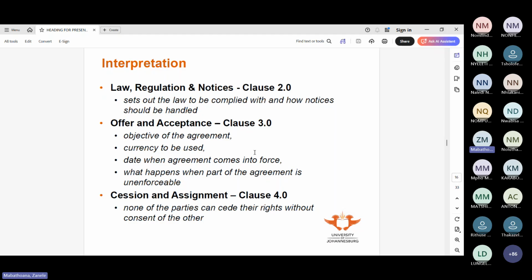He will obtain permits, licenses, and approvals that are required by law and pay the related charges for the execution of the works. So for instance, your construction permit, before the contractor starts, he has to issue a notice to the Department of Labor, and then they give him a permit to proceed, that sort of thing. So that's part of the law.